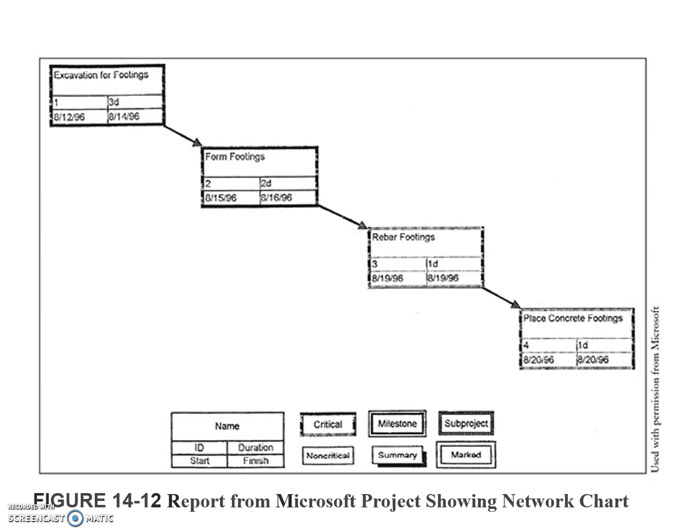All scheduling software today will provide the user early and late start dates along with the critical path, milestones, and end dates. Schedules also must contain the ability to be updated in a timely manner as actual progress is achieved in the field. A good software will allow management to compare planned activity duration and actual work activities.